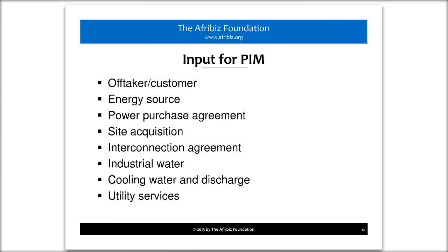It's not the actual power purchase agreement, but you can get some of the particulars worked out. Even with pre-feasibility, it's basically a high-level agreement. It's not official, meaning that you have it and it's signed off, but it's like a letter of intent, essentially, that they're in agreement with you that this is what it'll look like.